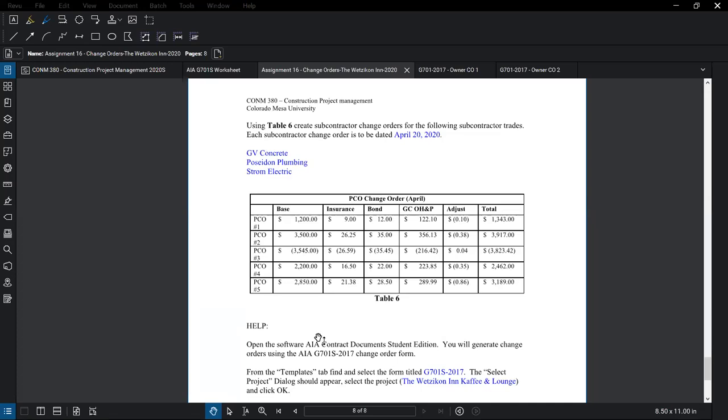because when you do the subcontractor change, you do not give them back this other stuff that's within there. So in other words, like the GC overhead and profit, which was built into the line item amount and all those different things, we're going to simply just give the $1,200 to the respective subcontractor, and then the insurance, the surety bonds, the GC overhead and profit.